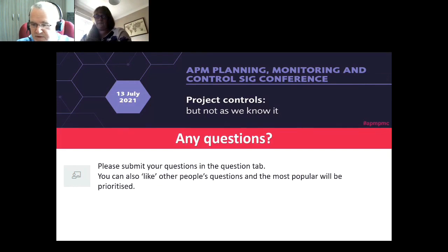But you could load it up with who was good at what in terms of their competencies, and then when you created a new project, you'd say these are the competencies I require, and you'd score each of the project managers on their competency, and it would pick the best person. It would then know if they were available or whether they were working on another task or project, and it would show you their utilization. And you could say, well, actually, I'll swap him and put her on it. So the actual resource management was particularly good as well.